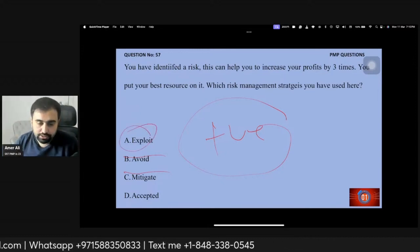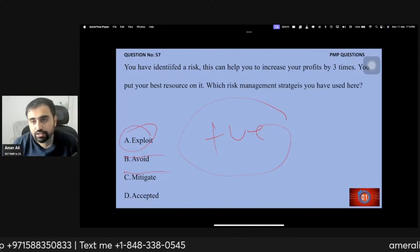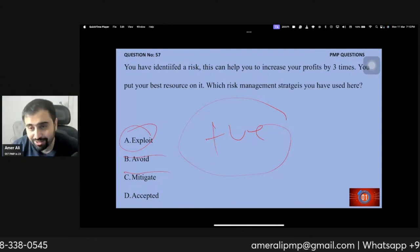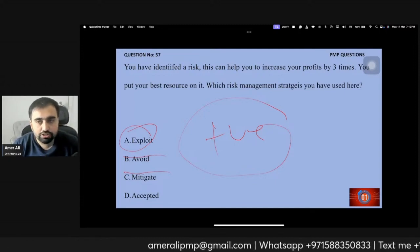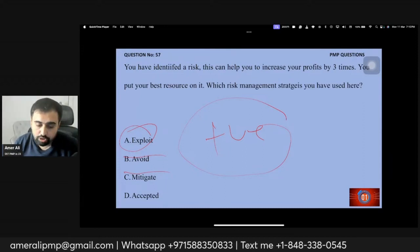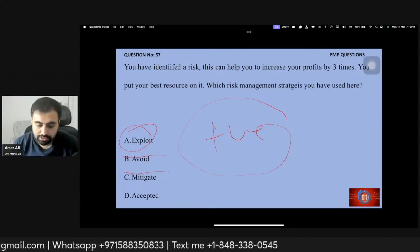We identified the positive opportunity and we implemented the response immediately. So this, we have exploited the risk. This is an important thing to know that exploit is one of the most positive terms in the PMP. So whenever the question says you have exploited the risk, that is kind of the most positive term to know in the PMP.